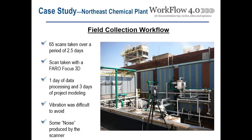For the project, they took 65 scans over about two and a half days. With the resolution set in the scanner, each scan took about 15 minutes, plus setup and teardown time and maneuvering through buildings and structure. They used the Faro Focus 3D — a lighter scanner that's ideal for mobility. You can put it in a backpack, climb up a ladder, do a setup, and continue on. Greg would have liked the newer Faro Focus X330 for better range, but the Focus 3D performed admirably.